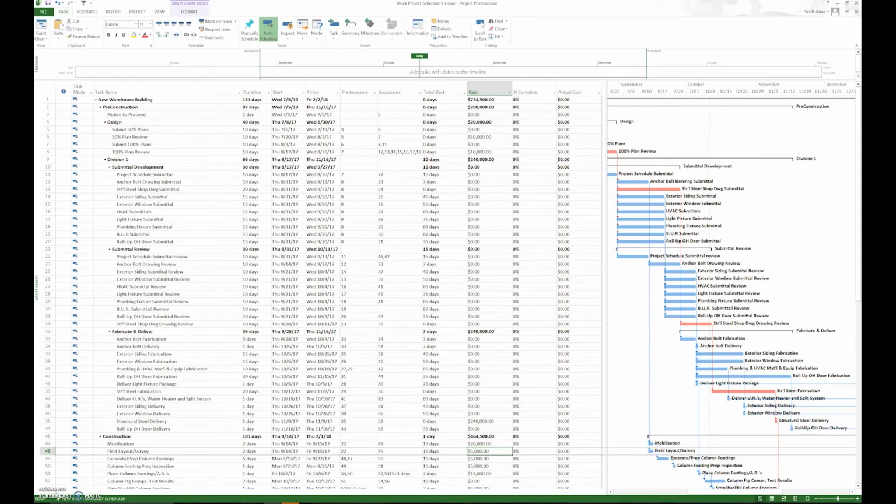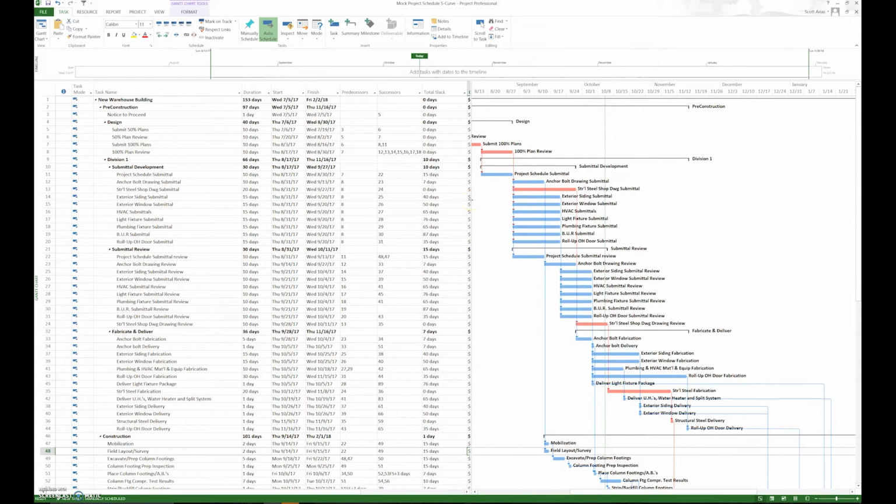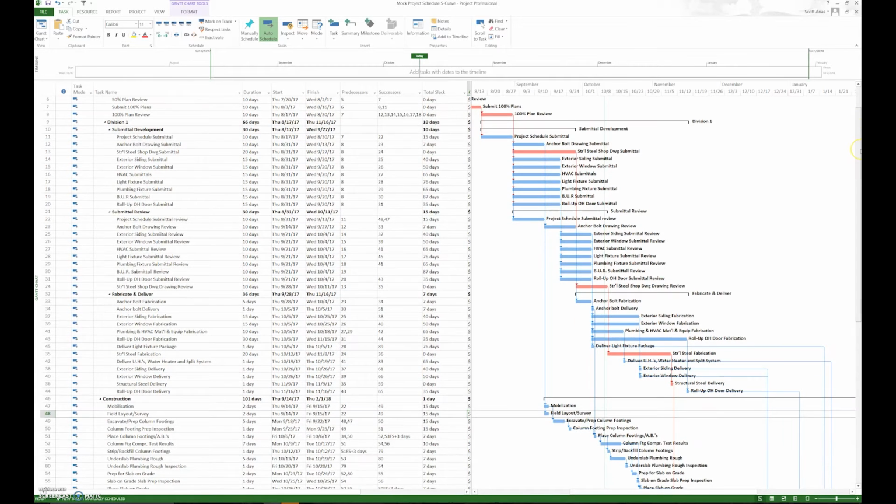Step 12 is reducing excess float. First, let's talk about the definition of excessive float. If a project lasts a year, excessive float would be 60 days. If a project lasts a month, excessive float would probably be 10 days. So it's all very relative. As a rule, you're looking at 40 to 60 days typically.